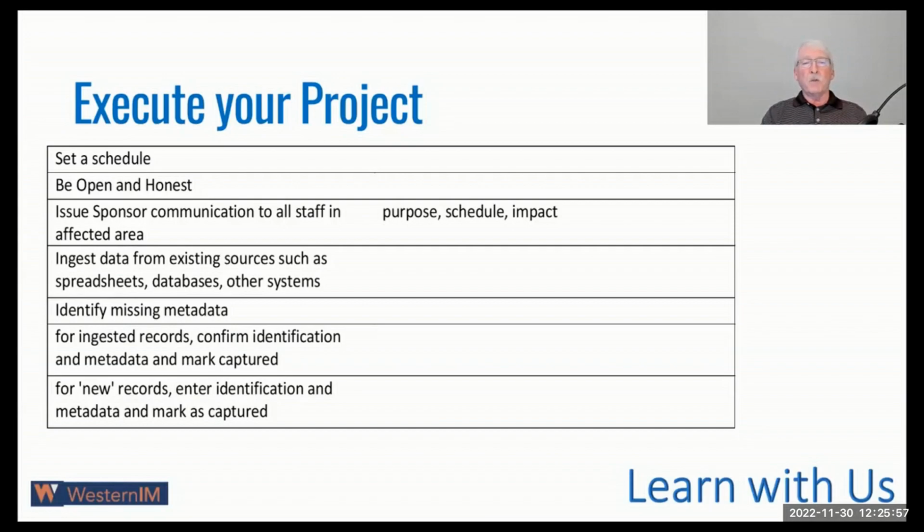Issue sponsor communication to all staff. If you're going to go to an area, make sure that somebody lets them know that you're going to be there ahead of time, so that they're not surprised when you get there.